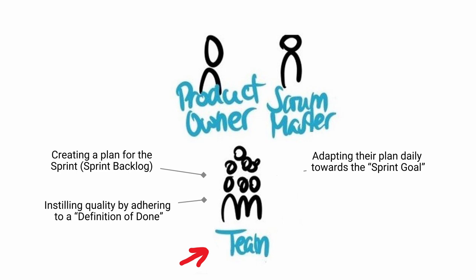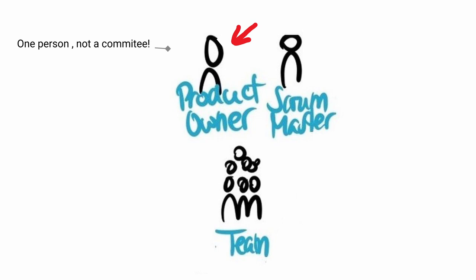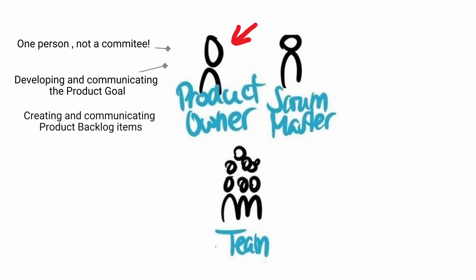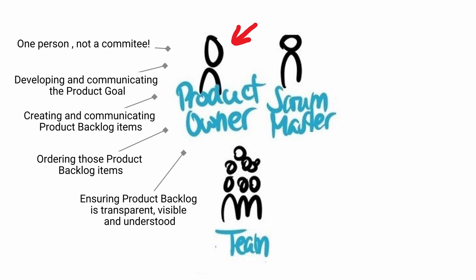Product owner. The product owner is one person and not a committee. They are accountable for maximising the value of the work of the team. Within Scrum they should be accountable for effective product backlog management, which includes developing and communicating the product goal, creating and communicating product backlog items, ordering those items, and ensuring that the product backlog is transparent, visible and understood. Note: the product owner may do the above work or may delegate the responsibility to others — regardless, the product owner remains accountable.